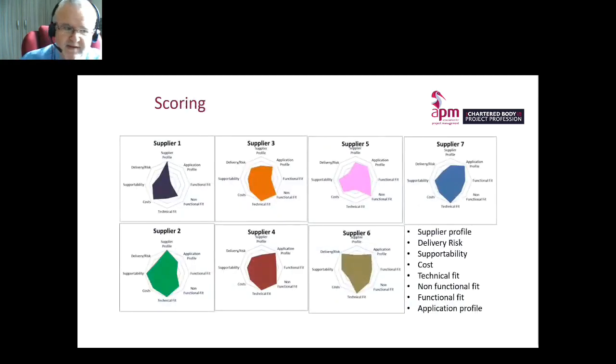In terms of the scoring, we had some criteria. These are not the actual data. Obviously, that's commercially sensitive. It wouldn't be fair on the individual companies. So this is just a made-up sample. But we had some criteria, some requirements, and then we measured each of those organisations against those requirements in terms of the supplier profile, the deliverables, etc. And this allowed us to actually make our selection.